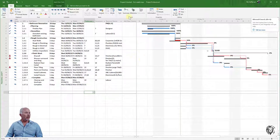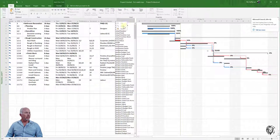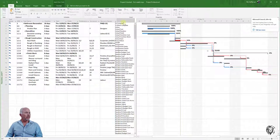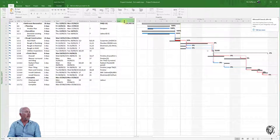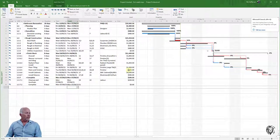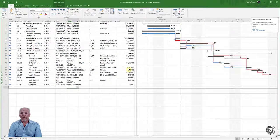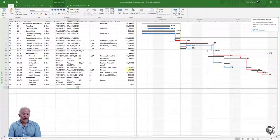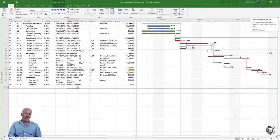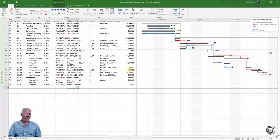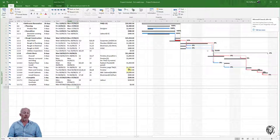We've managed to save ourselves a day just by increasing the resources. Let me add the cost column to check costs. We see that because we haven't increased the work, the task isn't actually costing more money. The reason we had the original duration is either that's what we felt we could physically do, or we only had those resources. By making extra resources available, it's saving us a day without costing more money.